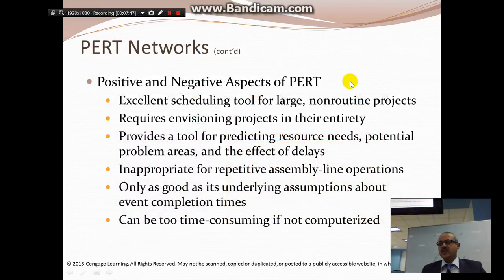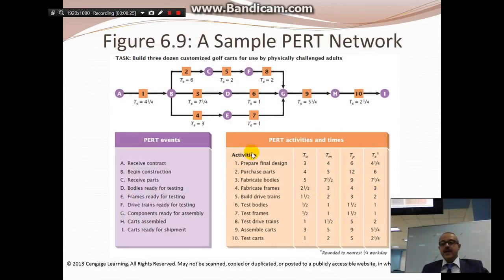Here it says what's good about this and what's bad. Number one, it is excellent scheduling for anything that's large, non-routine. If it's a routine job like making a sandwich, you don't need it. But if something's not routine and you can computerize it, this can be very effective. It requires envisioning projects in their entirety - you need to look at the picture as a whole. It provides a tool for predicting resource needs. You know how much time each activity requires and where you can have problems. If any one of these people delay, this will delay.